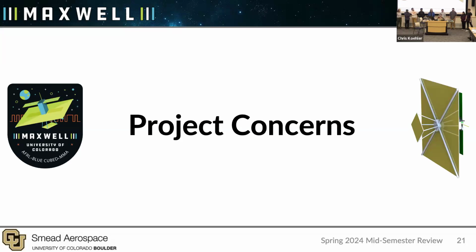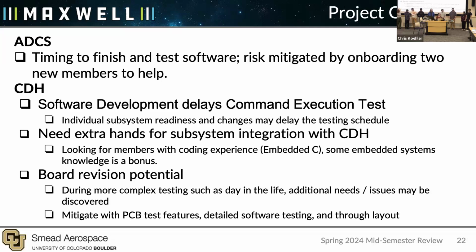Okay. Project concerns. For ADCS, we are finishing and testing software. It's going to take a little bit longer than we originally anticipated, but we're mitigating that risk by onboarding 2 new members to help, or we have already onboarded 2 new members to help.